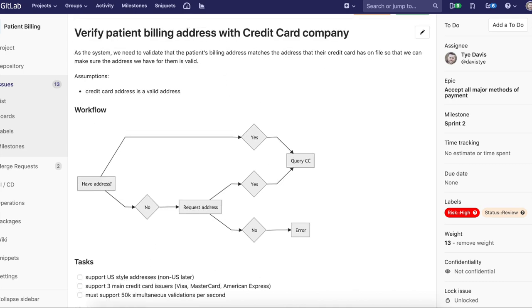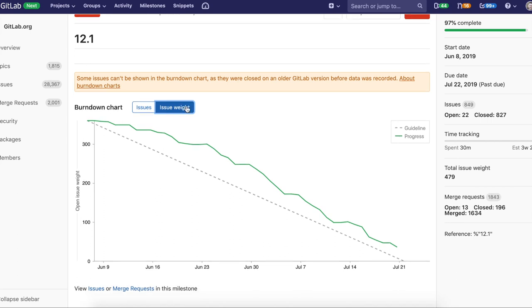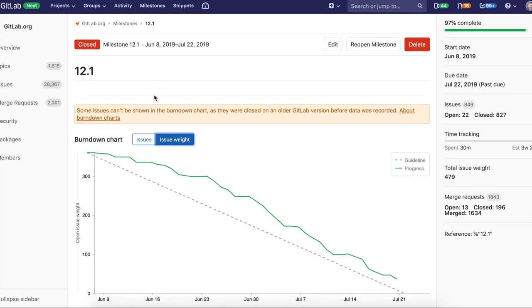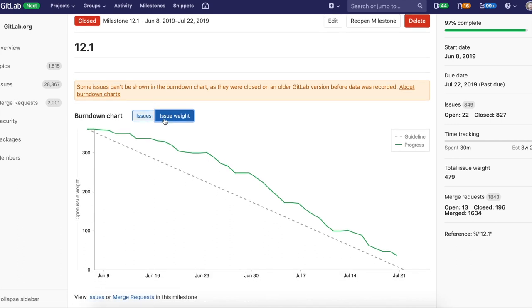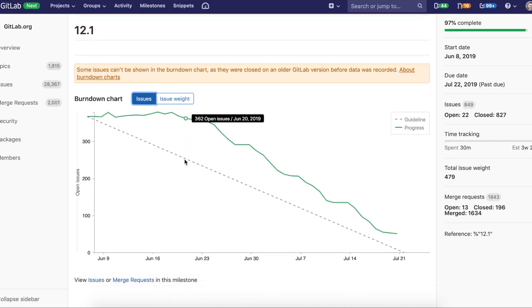I want to take a look at if we need to see how burndown is going. We can see this is an actual release that we have at GitLab. You can take a look by issue weight or issues. It gives us great visibility into progress as part of that sprint or that release. Over here is showing you how many issues are closed and open. It's a great spot to track progress of teams.